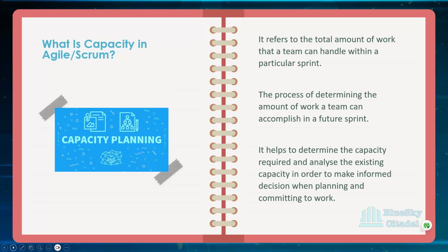And what that helps you to do is determine and analyze things. So in a situation where, during the sprint, the product owner decides to bring something in, you don't just take it in and start working on it, because you're looking at your capacity to say, do we have the capacity? Are we able to accommodate this work that is coming? How big is it? Is there any member of the team that has finished what they need to do and still has capacity, room to take more? So you need to plan your capacity because